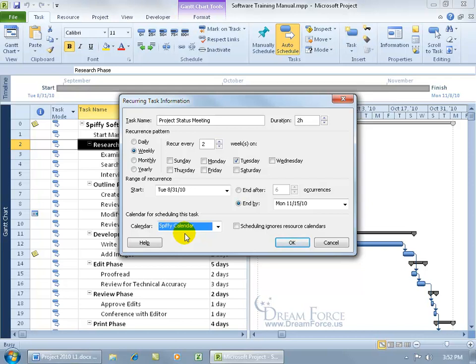In short, resources always take precedence over the project calendar, because when you're working on a task here, if the resource is on vacation, guess what, you can't force the resource in here, so the resource calendar takes precedence over the project calendar. I mean, if your resources are always going to be there and you don't have any time conflicts, then I guess you don't need resource calendars. Like I said, we'll cover that in the next training video.